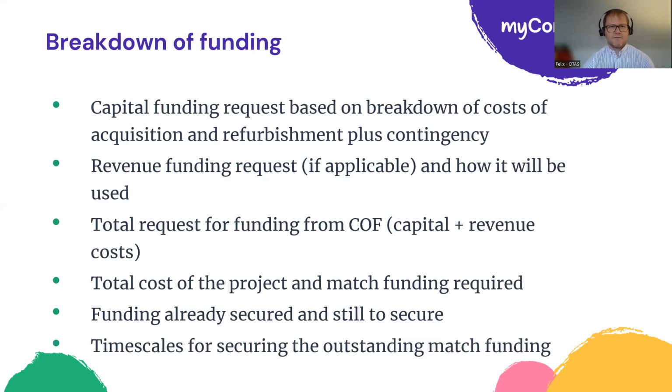So, looking at the breakdown of the funding that you're going to ask for. The capital funding request should really be broken down into the costs of the acquisition, the refurbishment, plus any contingency again, and I would say put in a reasonable contingency.